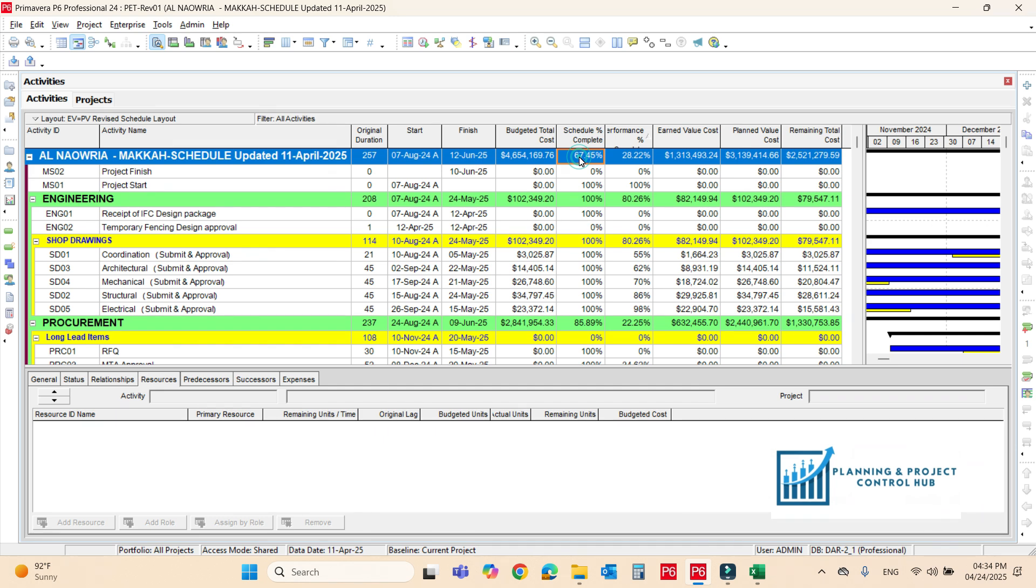For the recovery schedule, there is no scope changes, there is no variation orders, there is no EOT, and you have to use the same milestone. For the revised one, you just need the mitigation layer for the recovery baseline.